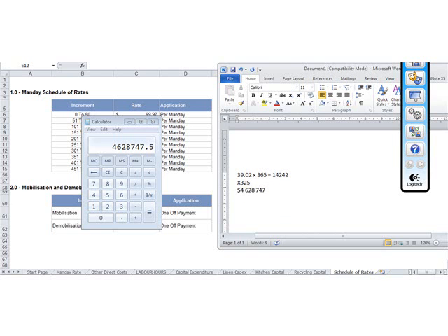But to bring this out more clearly, let's pretend that this Manday rate was a little bit different. Let's pretend there's another organisation and their Manday rate ended up to be, let's say, just $42. Okay, so just $42. Times that by 365, times that by 325. Now we have $4,982,250. Now that's a massive difference. Just for a few dollars in this Manday rate, this second bidder is now $300,000 more. So then your client is going to start asking, well, what's the difference? Why? What are you providing that they're not providing? Or they're going to start to question things.